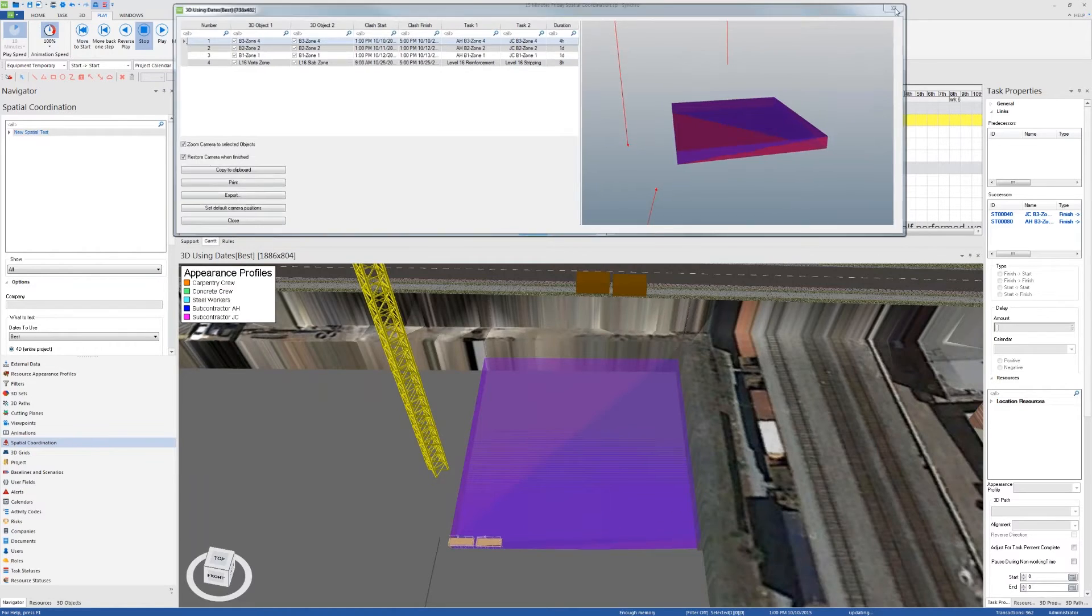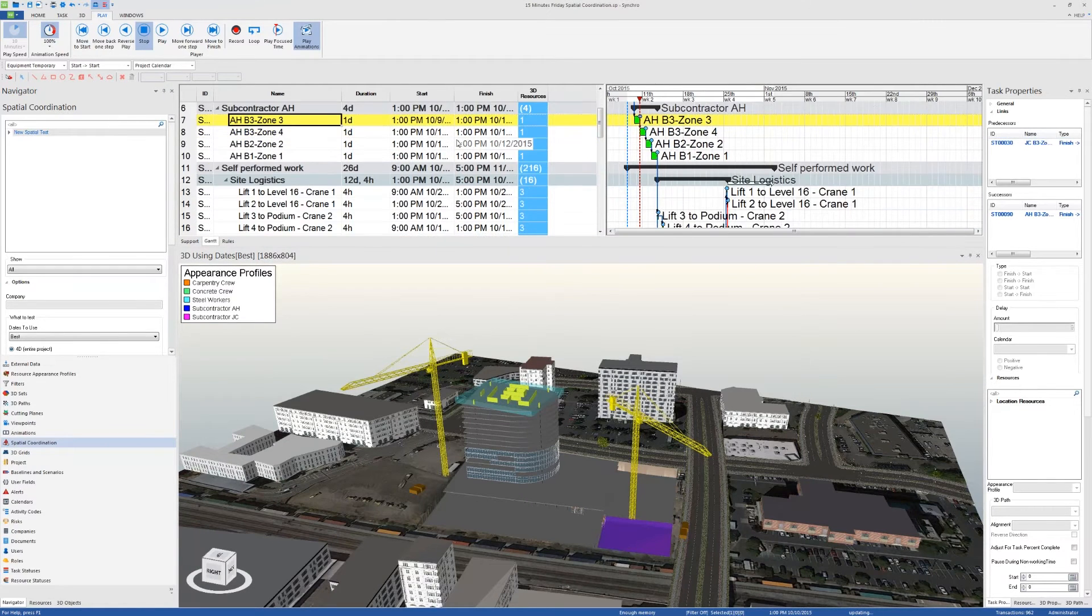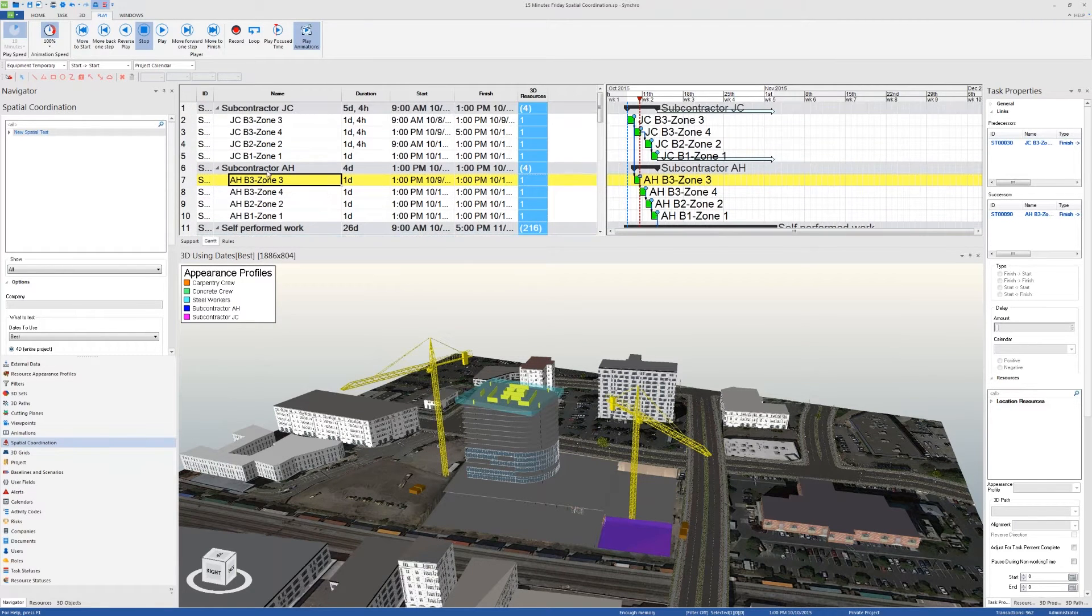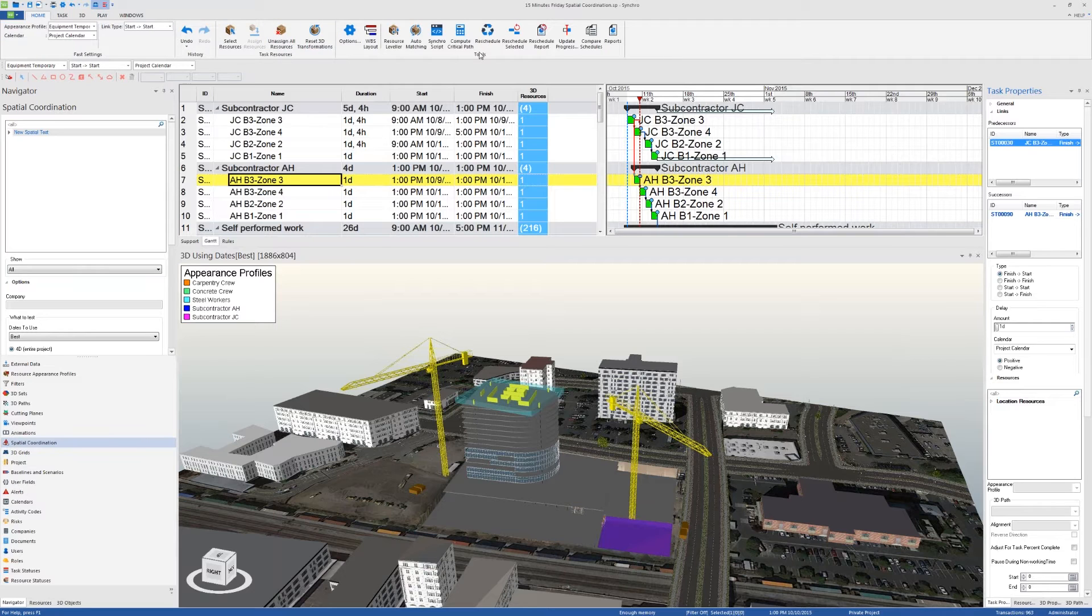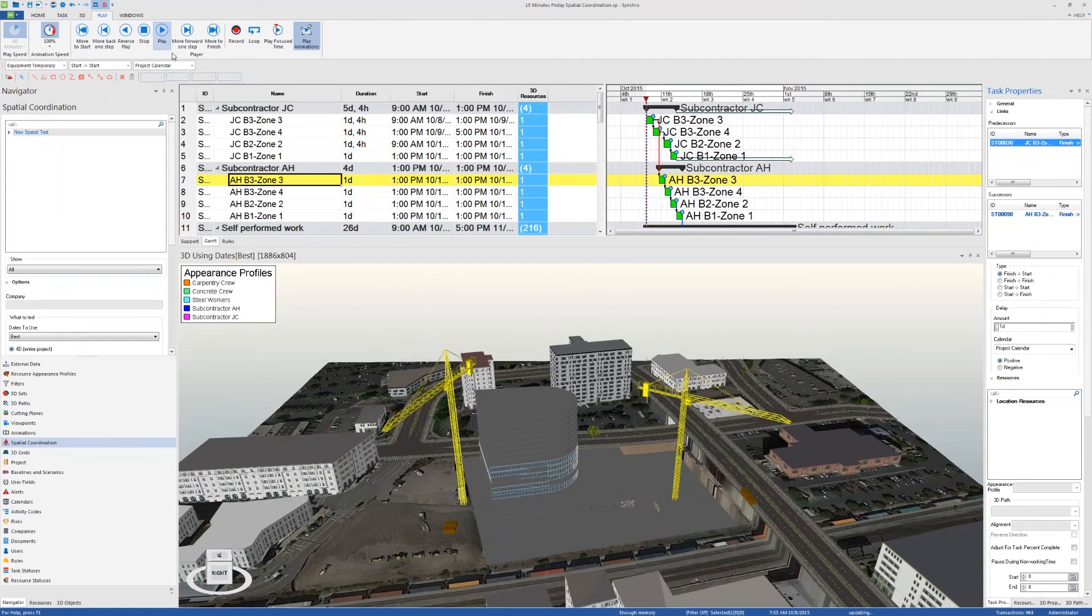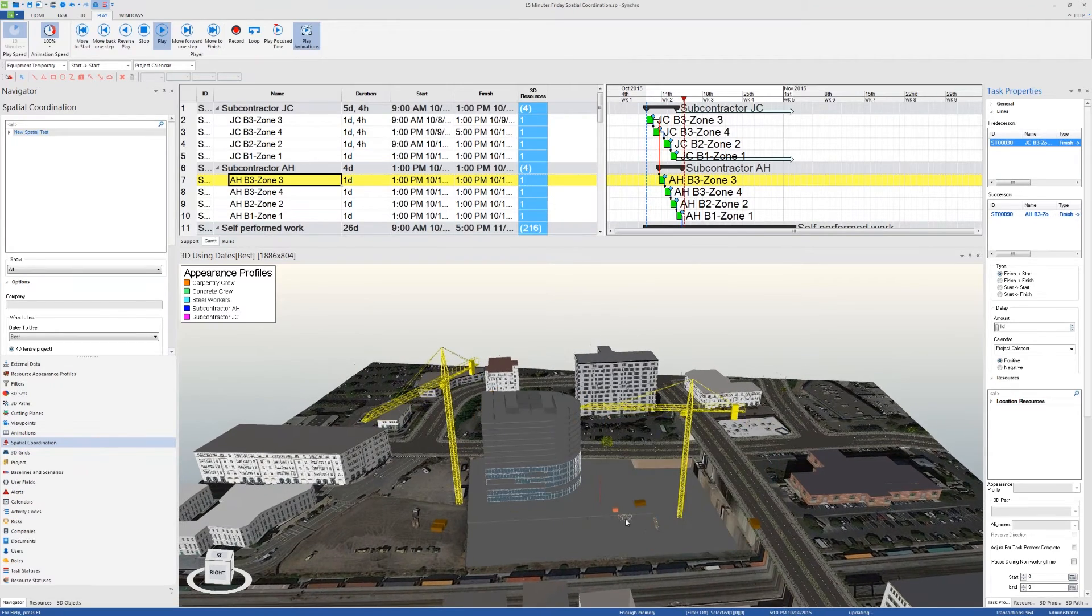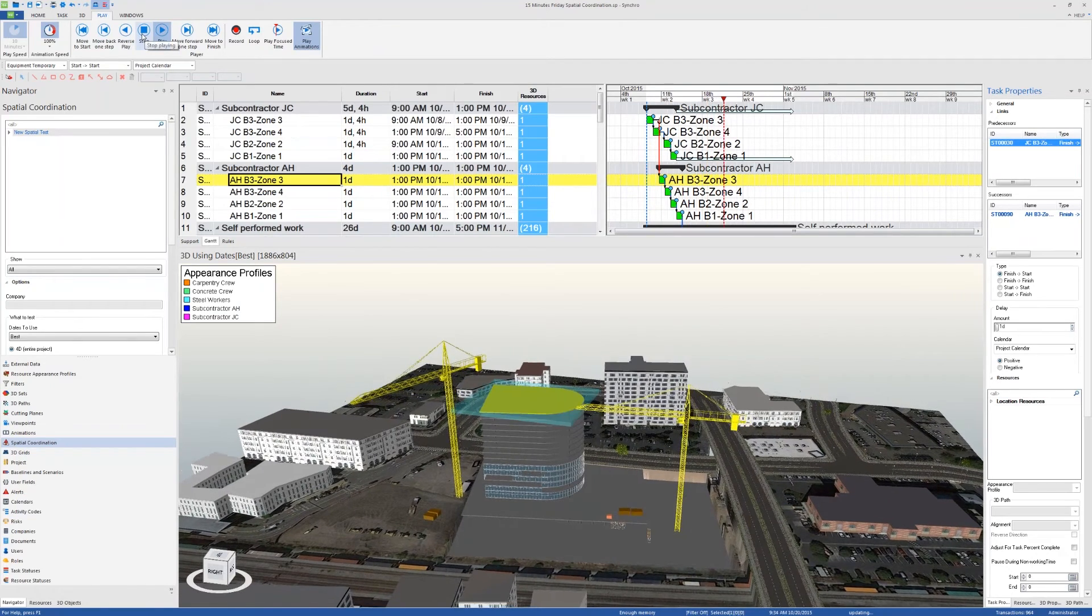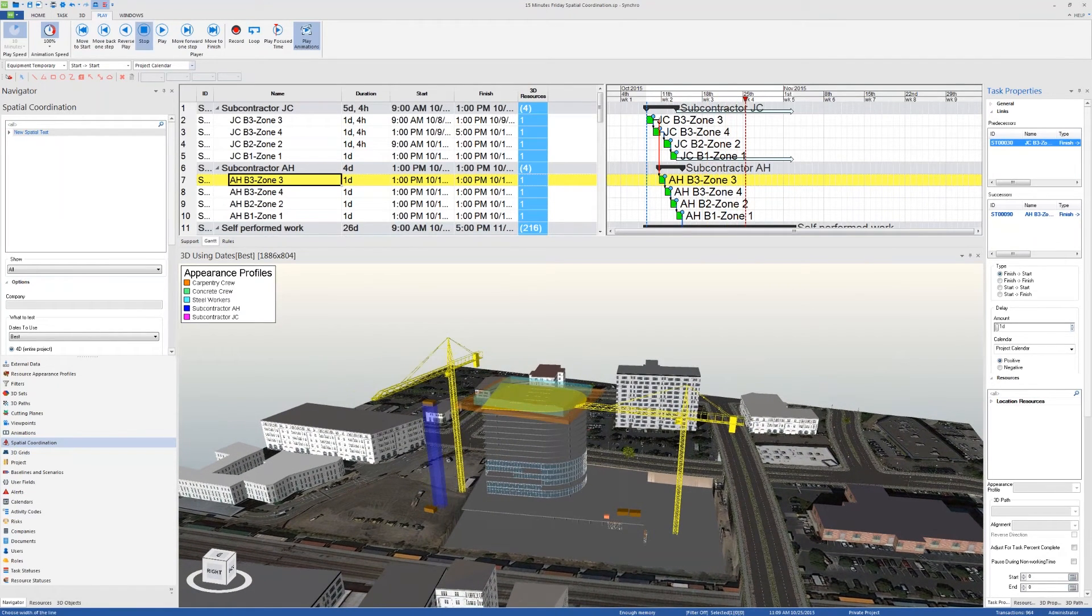I'm going to click on exit. These sets of activities are non-critical as we can see from the schedule, so I'm going to push this activity by one day. I go to task properties, links, and I'm going to add a one day delay, then click on home reschedule. Let me play the animation again to see what's happening. As you can see right here, the boxes are not overlapping anymore.